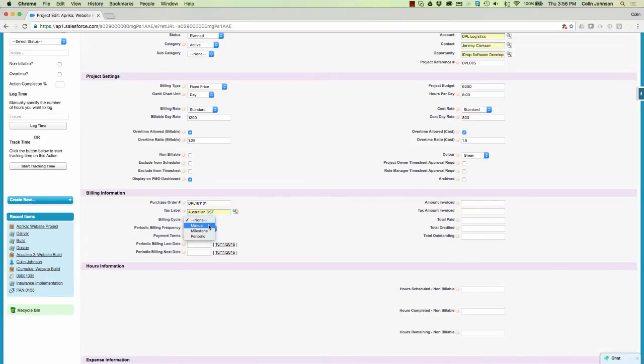So I have the option to choose from three ways of generating invoices. So I could be saying it's going to be manual. So what that will be is that I'll just personally go and create the invoices as and when I need them. Milestone will be upon the completion of a particular milestone on the project. If we've set that to need an invoice creating, it will automatically be created for us in the background. And periodic is for time and materials projects. That allows us to specify that we're going to be doing that on a periodic basis, and the frequency might be weekly, fortnightly, or monthly.